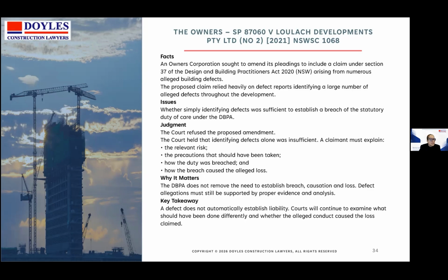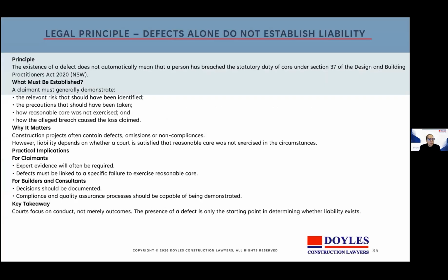And a defect doesn't automatically establish liability. So the courts will continue to require evidence explaining what went wrong, what should have been done differently, and how that failure caused the alleged damage or economic loss. Defects alone don't establish liability.